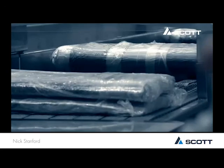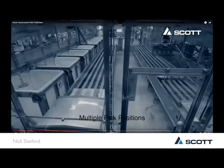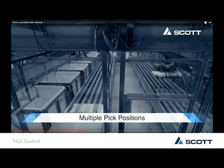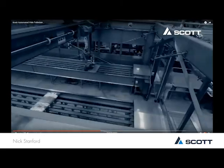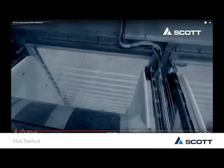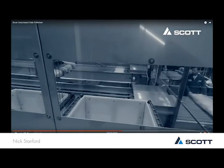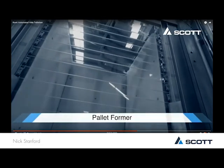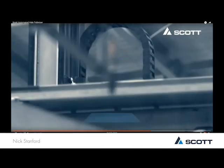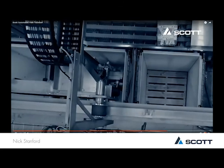So Nick Murphy here. While this is going, I'll add a few things. This video was taken when we were doing FAT of the system in Dunedin, with the 2 grippers working at the same time. We proved at that stage that we exceeded the cycle time we were supposed to have, 450 per hour, reaching 520 an hour. The challenge is that the operator who has to fold the hides has to be able to catch up with that rate, which usually they cannot. If they can, the system can do 500, 520 an hour.